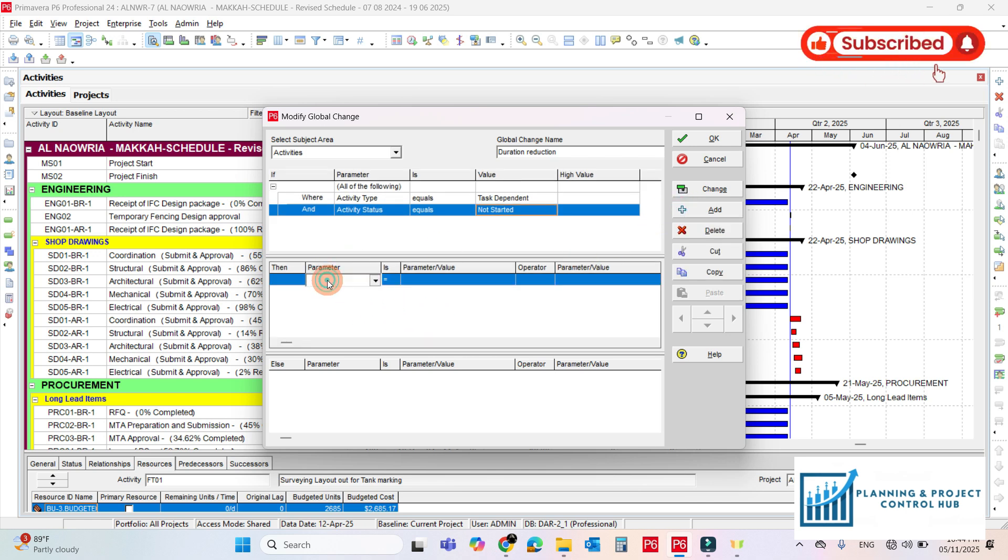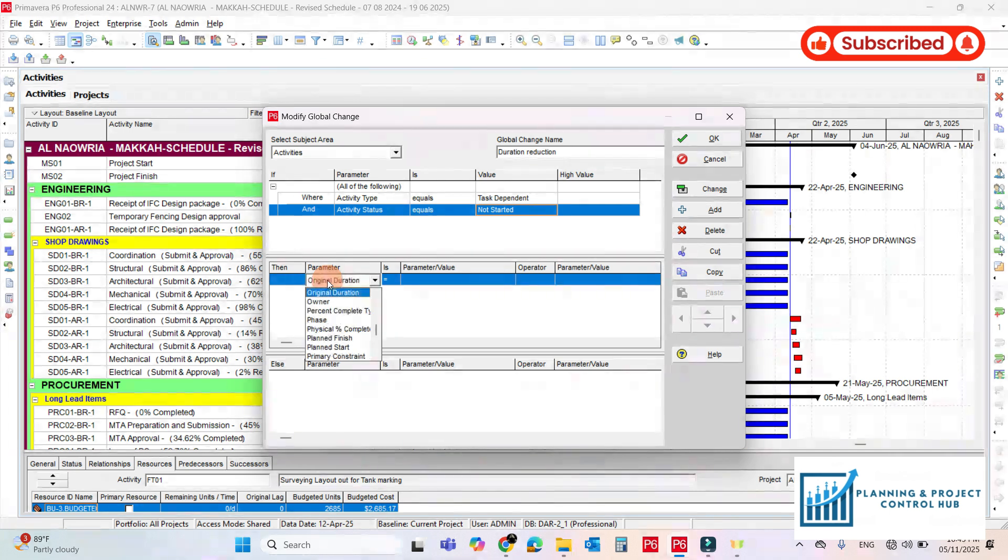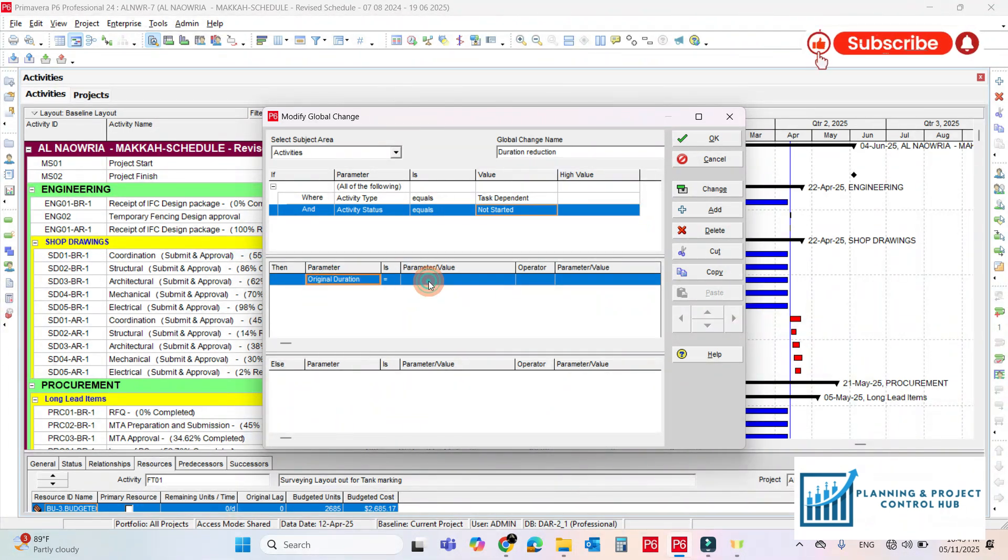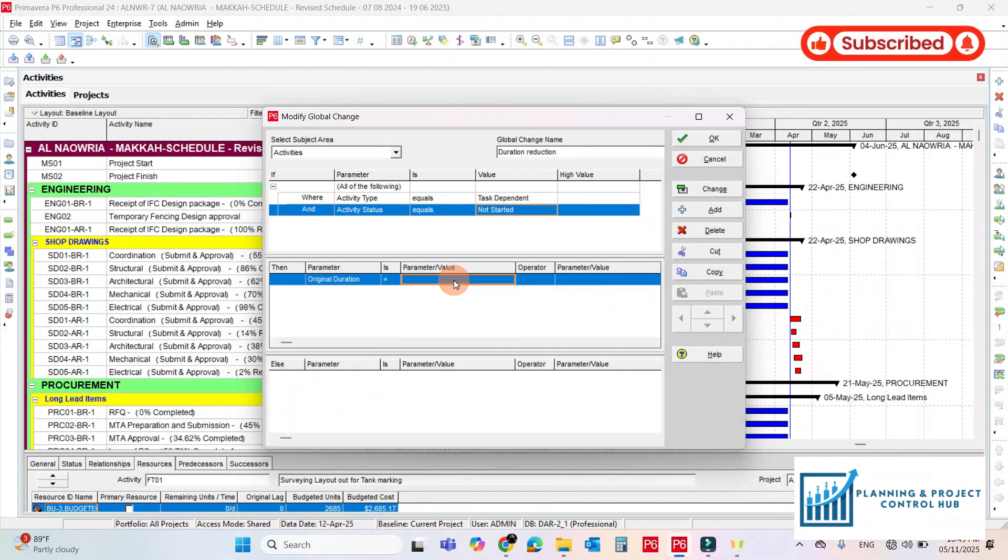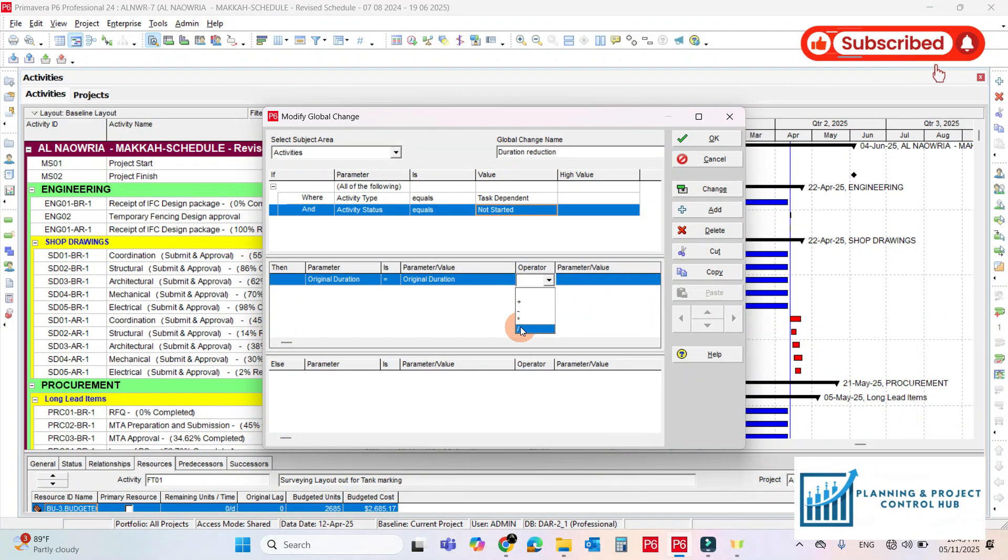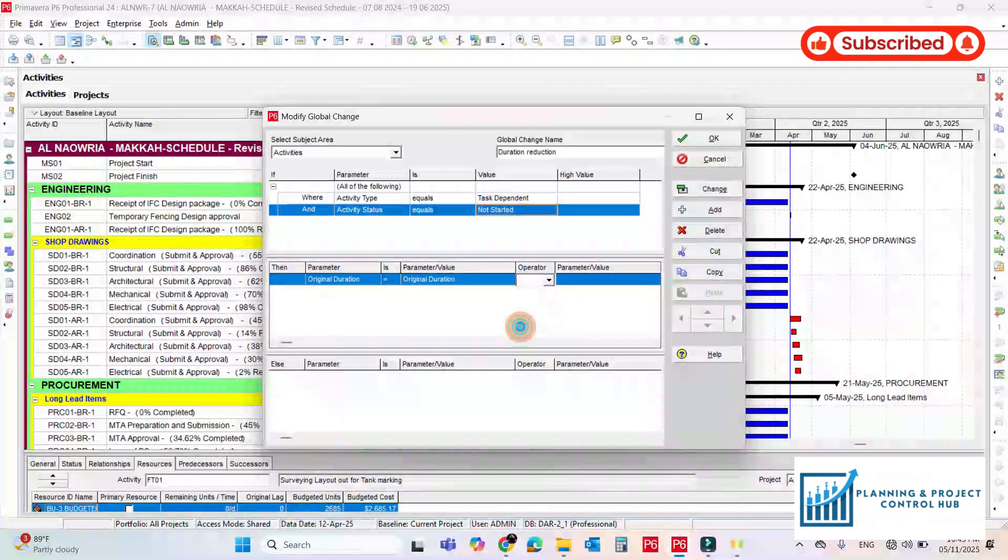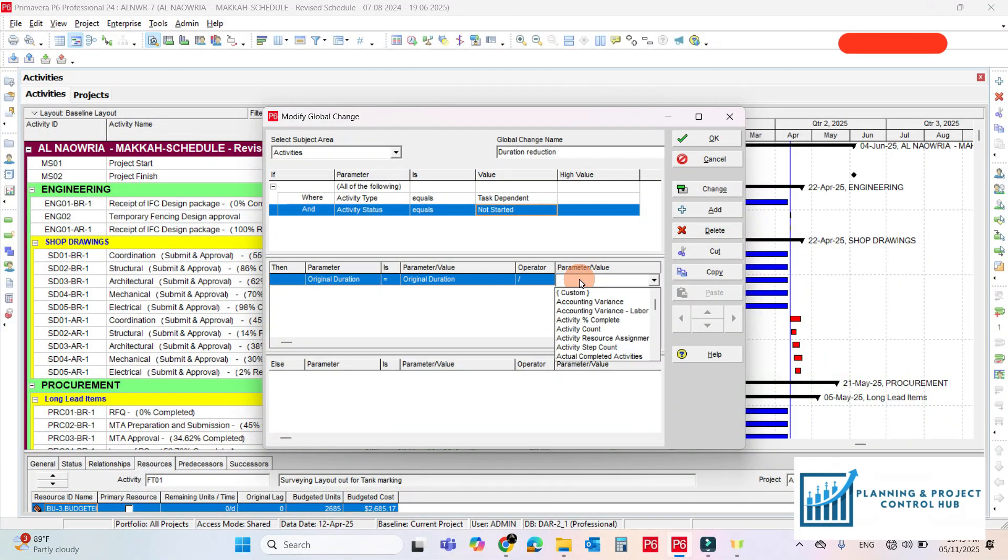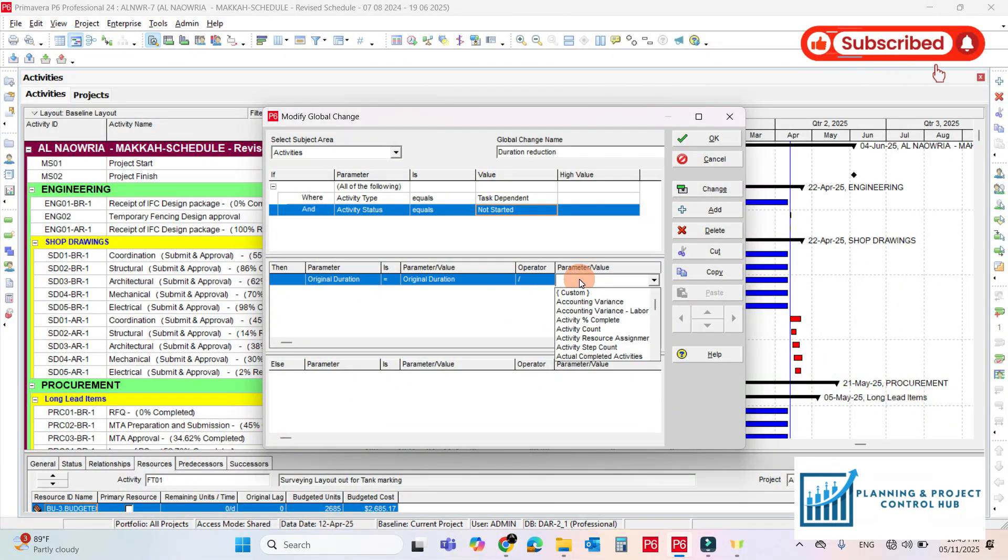I need to reduce the original duration, should be equal to original duration divided by 2, because I need to reduce the duration of the not started activities by 2. Write 2.